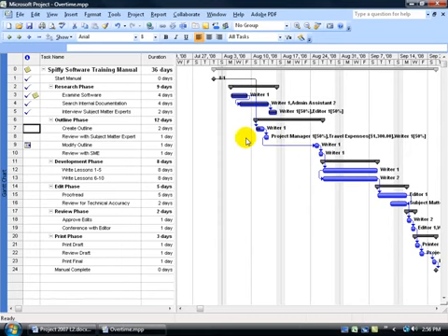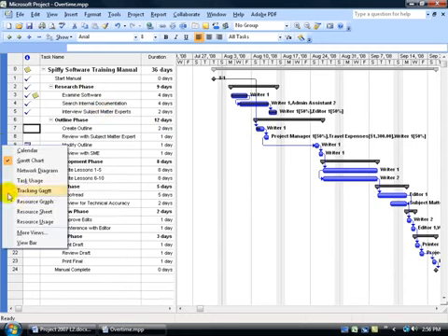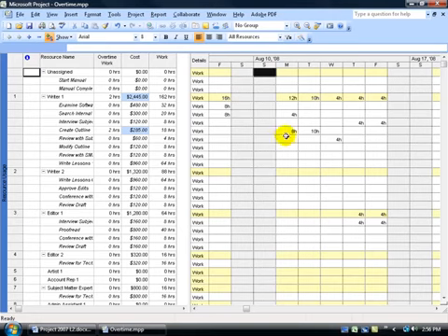So you won't be flagged for these except for your over allocated resources, which won't be flagged if you've marked them complete already, as we just learned over here in the resource usage view. That Rider 1, the reason why he's not over allocated again is because he completed this task, and this task has yet to be completed, creating the outline.